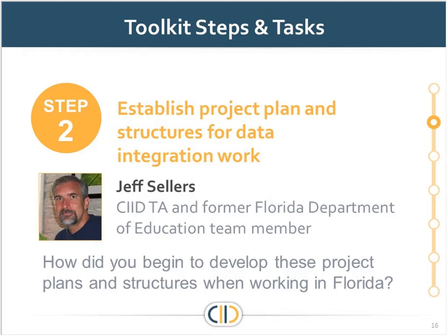Along with that, since there were several players contributing data, and players being program offices, each program office that was contributing data to be integrated into the system identified a point of contact for us, so that as we progressed through the project itself, we were able to touch base with those individuals as needed, and again, based on what was documented within the project plan.